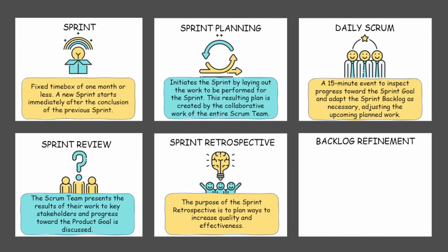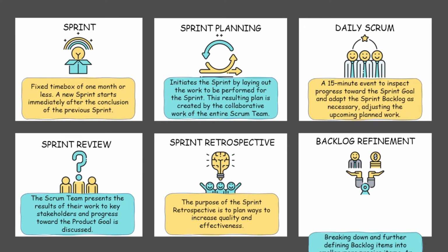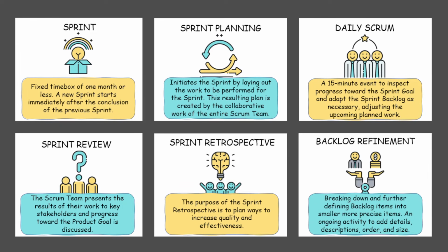Last but not least, the backlog refinement event is not a mandatory or identified formal event in the Scrum Guide. The action is carried out by the team and the product owner, but it could happen all throughout and does not need to be an event. But I put it here for you to understand what it is: breaking down and further defining backlog items into smaller, more precise items, an ongoing activity to add details, descriptions, order, and size information to the product backlog items. And in many instances, you hear those items being referred to as user stories, but that's for a different day.